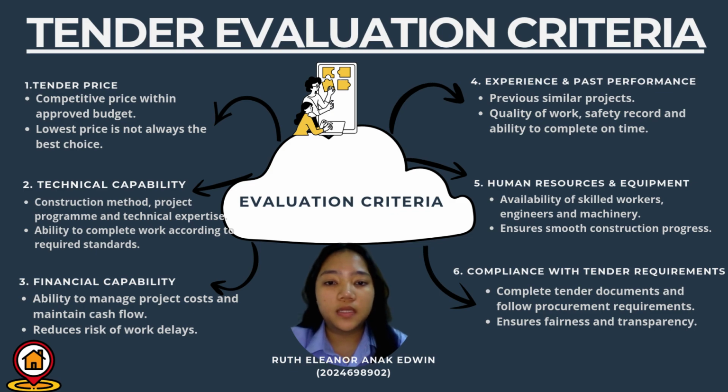Next, I will explain the tender evaluation criteria proposed for this project. To ensure the best contractor is selected, HDC Sarawak will evaluate each tender based on six key criteria: tender price, technical capability, financial stability, experience and past performance, human resources and equipment, and compliance with the tender requirements.